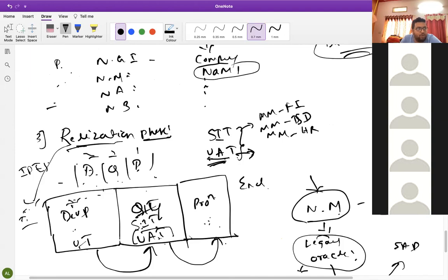Okay, these things I don't want. Again, we need to go back here to the development server and change the configurations. Again, unit testing we need to do, quality SIT we need to do, and then UAT, again we need to show it to them. If he is telling any changes again, we need to reverse the whole step.